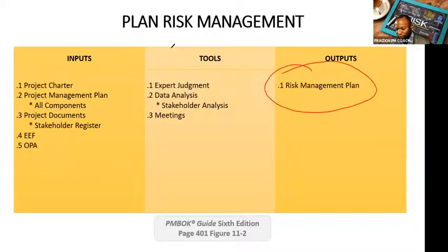What tools are we going to use? What is our approach going to be? This is where you now get into more detail, more tactical detail. The roles and responsibilities of people who are going to support risk efforts is also here. The funding also needs to be discussed. Who's going to provide the funds for all these risk activities? The timing. When are we going to meet to discuss risk? Oh, during the weekly meeting. That stuff needs to be talked about.